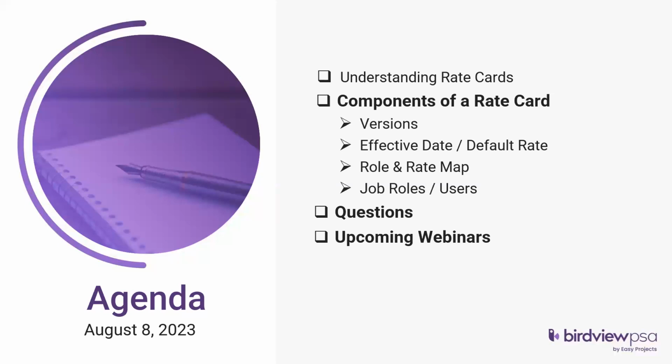You can utilize rate cards if there's a shift in assignees or resources working on projects. As an example, Mr. John is a project manager on a project, but he is moving on to a different role and is no longer going to be working on project A, and somebody else is taking over. If you have a role assigned as project manager versus John, it helps you automate and manage the rate cards instead of going in and updating users every single time.